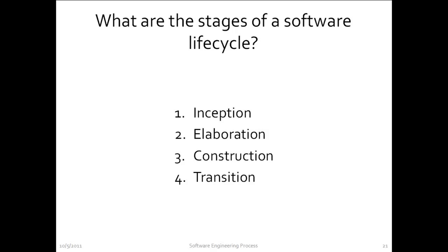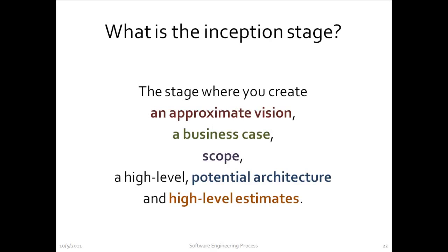Once again, these stages progress from a situation of high-level understanding and low certainty to detailed understanding and high certainty, with interactions beginning mainly between the sponsors, stakeholders, and high-level technical personnel, to then progressing to the development team and then to the consumers of the system, that is, its customers. The project may cycle through these stages many times during its lifetime. Potentially, this may happen as much as once per release, and perhaps even once per iteration if the system is complex and not well understood.